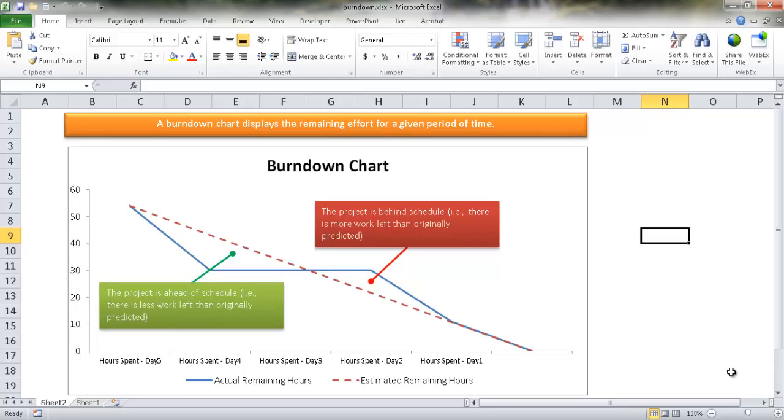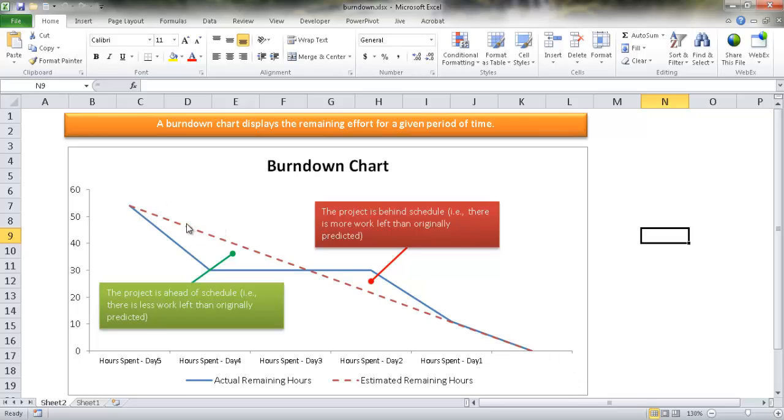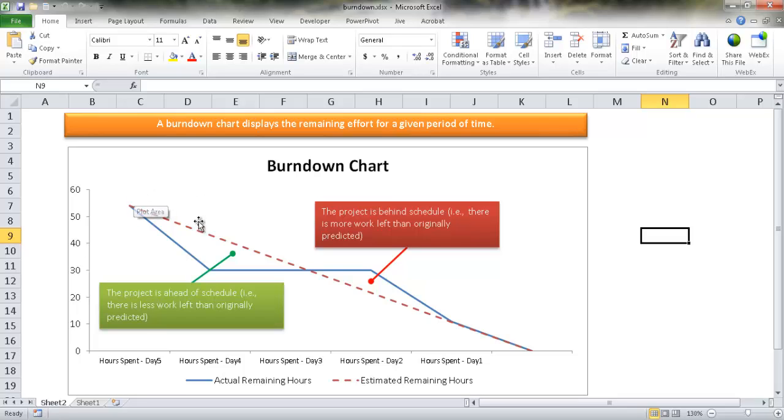So here we're going to concentrate on creating a basic burndown chart. With the basic burndown chart, we have really two series of data. One is your estimated hours. So we have this red line here, which is basically our estimated hours that we think something is going to be completed at. It's going to start at the hours of all the combined tasks that it's going to take to complete it and eventually go down to zero. So that's that straight linear line.